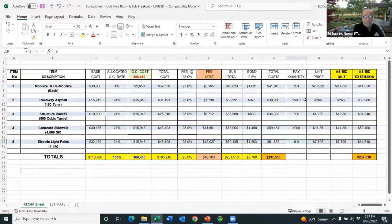So the next column is, we take the total cost, and the spreadsheet divides by the pay quantity. Divide 39,000 by 150, divide 34,000 by 800, divide 59,000 by 4,000, etc. And we come up with the unit price. And that's what's going to go in the bid form under the unit price for that item. But these are exact, absolutely exact. However,